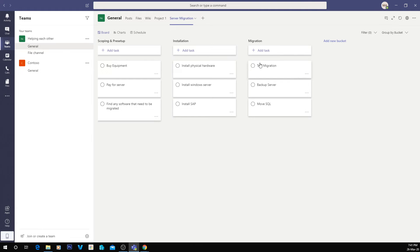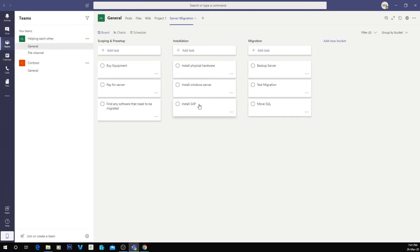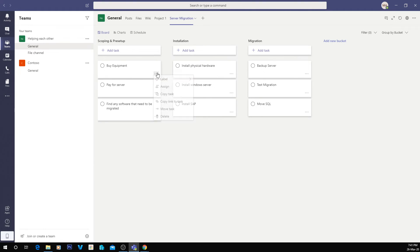Then we're going to do a test migration. We might even back up the server first, do a test migration, and then do the live migration. So what you can do with these things too now that we've got them sectioned into buckets, is we can allocate these tasks to people.